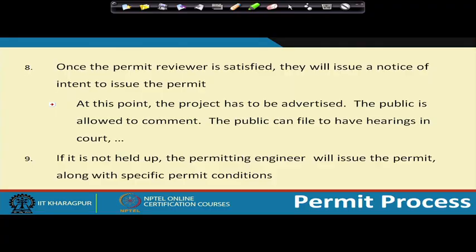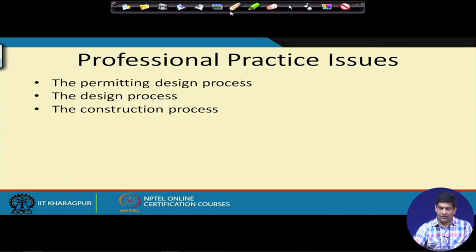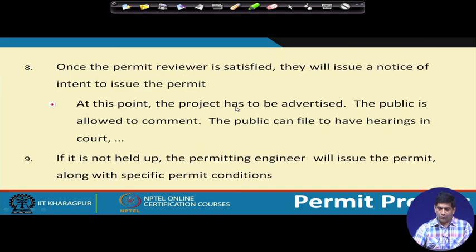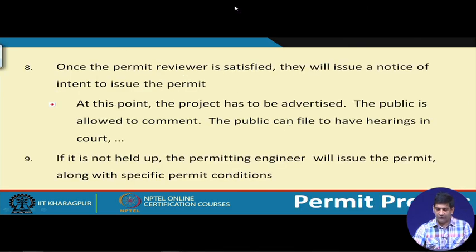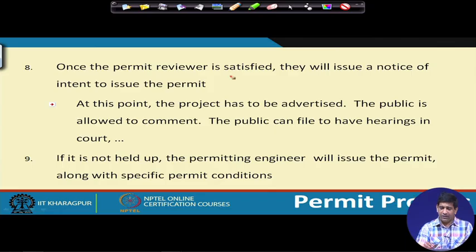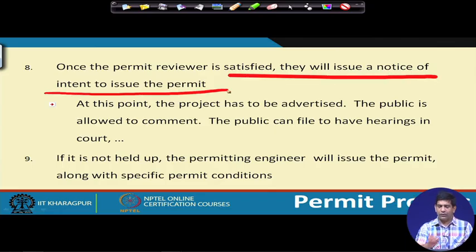Once the permit reviewer is satisfied with your responses, they will issue a notice of intent to issue the permit. So you will get a notice of intent to issue the permit. At this point, the project has to be advertised.